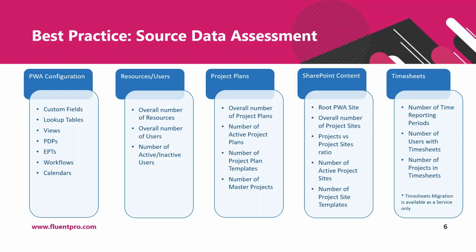For the resources and users, you would want to assess the overall number of resources, overall number of users, number of active and inactive users, and make a decision whether user accounts will have to be created in the target PWA environment for inactive users or not. These accounts will be used for the account mapping during resources upload, resource mapping during projects upload, and user mapping during SharePoint content upload.